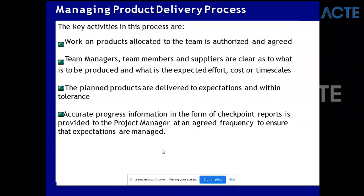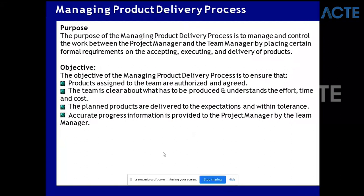How do they take care of time and money in Managing Product Delivery? The project manager will work very closely with the team. He will know that the plan was to finish an activity in five weeks, and if they are in week four with a lot of work still left, that means they are out of schedule. So he will push, pull people, get more people to work, or have longer working hours to finish. That's how it works - that's why it is important to accurately update progress information so that corrective actions can be taken.